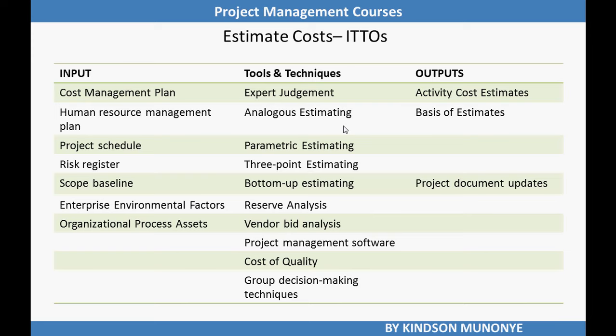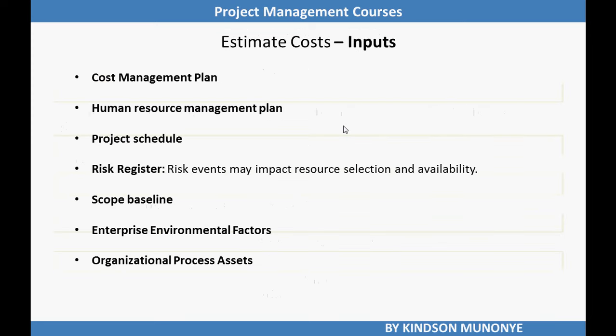Let's take a look at some of these ITTOs. The cost management plan is the output of the plan cost management process discussed in the previous presentation. We also need the human resource management plan to provide project staffing attributes, personnel rates, and related rewards and recognition, which are necessary components for developing project cost estimates. We also need the project schedule as well as the scope baseline. Remember, the scope baseline is the approved scope statement together with the WBS and the WBS dictionary. We also need enterprise environmental factors and organizational process assets.